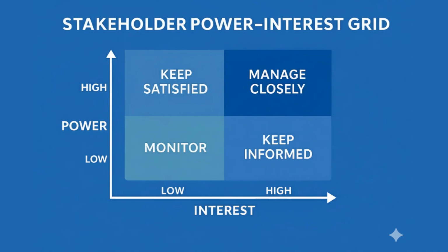For a banking project, you will have CEOs, board of directors, project sponsors, CIOs, CTOs, key regulators like RBI in India. These are all stakeholders with high power and high interest. They are all critical to project success. For example, they would be directly accountable for project success. They are the ones who are going to approve the budgets and they are the ones who will provide strategic direction. They can even penalize if compliance failures happen. They can even halt the project.